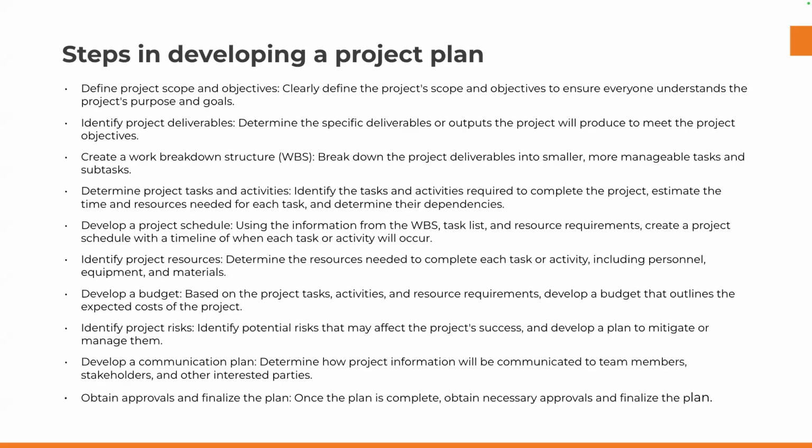Then from there, if you remember, not yesterday, last week, we said you start off with the goal. What is the goal of what we're trying to do? Let's just sum it up. We take the goal and we break it down into milestones. From milestones, we break it down into deliverables. From deliverables, we put it down into actions, tasks, activities, and we can go as far down as we want to.